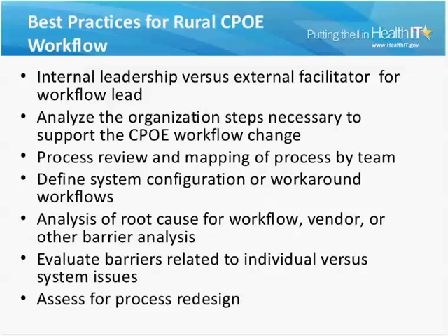Process review and mapping of process by team. We do this at every implementation of an EMR, even at the smallest level. We take a look at what is the current process, because no two processes are completely the same. They're all similar. You have similar steps, but there are workarounds and workflow issues that are put in place by practices. They do it for a reason. We want to make sure those are captured so that if we do need to implement those at the larger level, that we are able to.